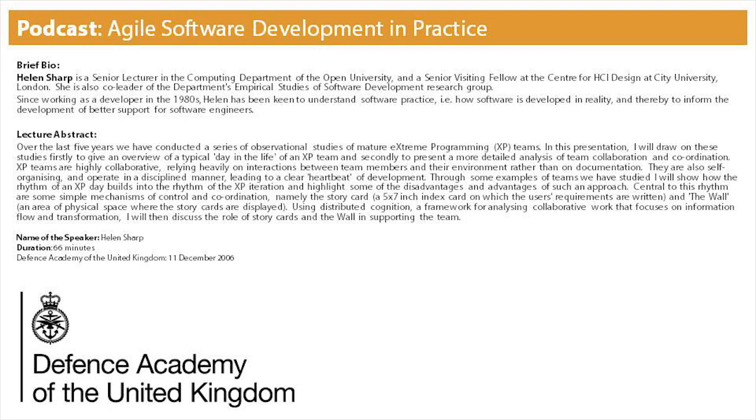So that whole notion of constant improvement, reflection and improvement is quite key. So they go through what worked, what didn't work, and how can we improve. At the end of an iteration, that might be just an hour. At the end of a release, it might be as long as a day. And there's all sorts of things in between. But it's actually quite important to do that kind of retrospective.